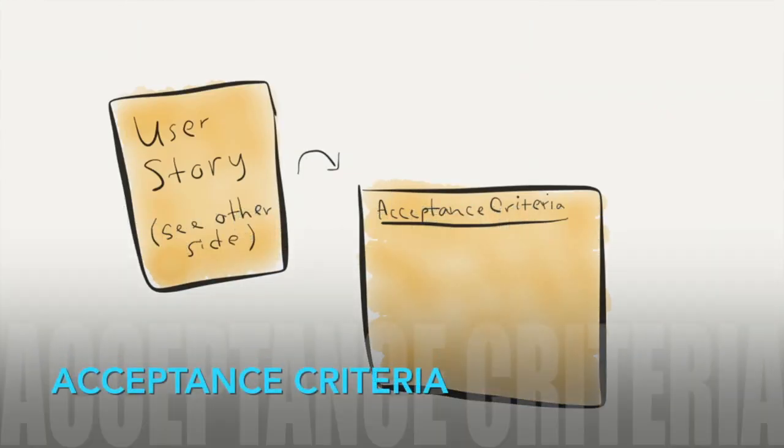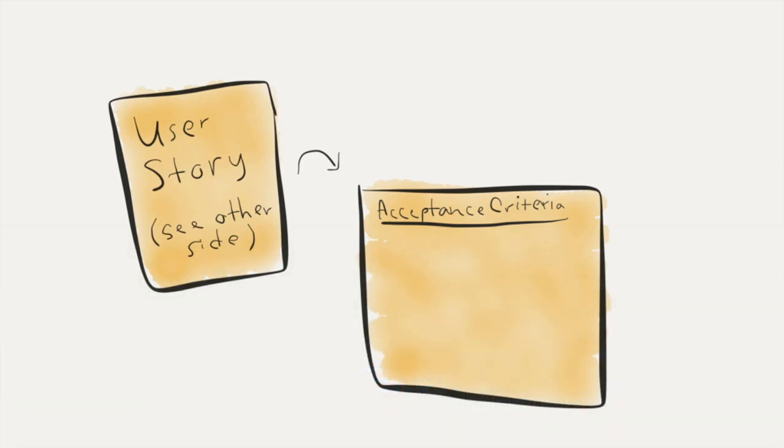Acceptance criteria are necessary to validate whether the solution meets the needs of the user. This is where teams take deep dives and agree on confirmation of what is to be built. They define the requirements, outcomes, or conditions that must be met, such as what information must be provided, what operations must be performed, what performance and responsiveness is necessary, what level of security is necessary. They can be written as statements or even questions. For example, what if the user's device loses power while they're entering info?